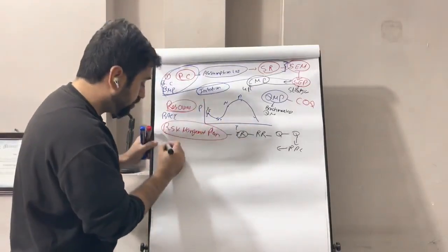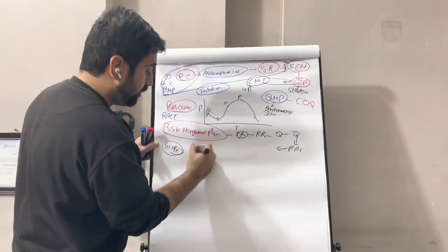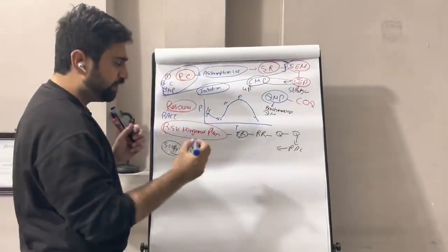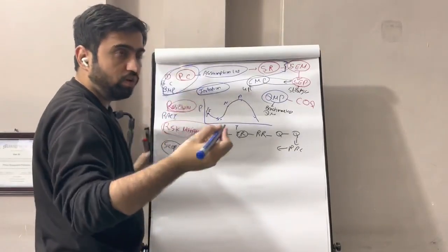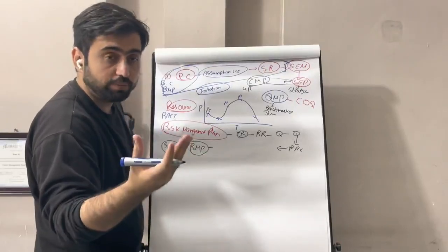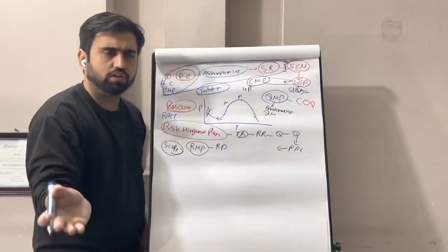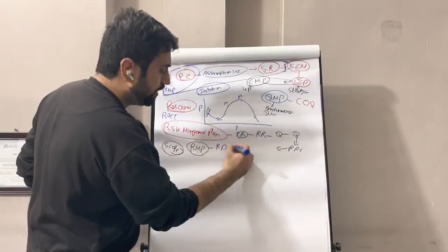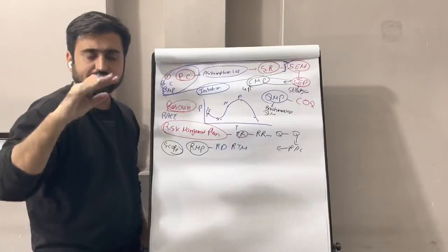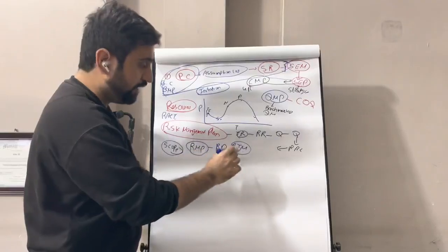Now we make scope management. We went to the scope domain. So first we make the requirement management plan. The requirement management plan defines how the requirements will be collected and defined, and we collect all the requirements through various tools: prototype, context diagram, focus group. We make requirement documentation, classification of requirements into functional, non-functional, stakeholder and solution, and the requirement traceability matrix. The matrix tracks the requirements from start till end, and everything is written in there. These are very important documents. So the requirement management plan helps with this.